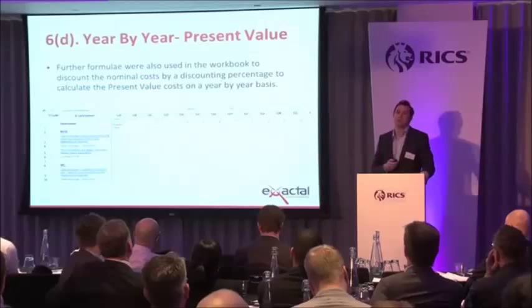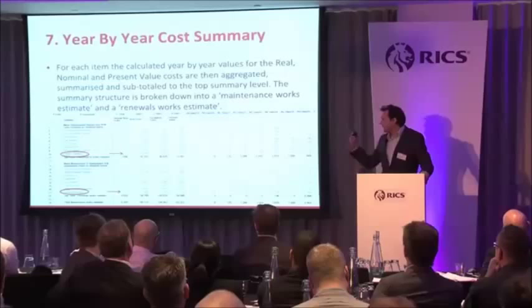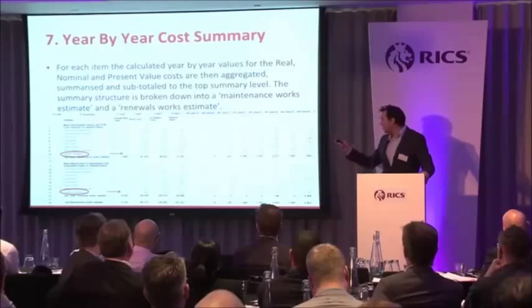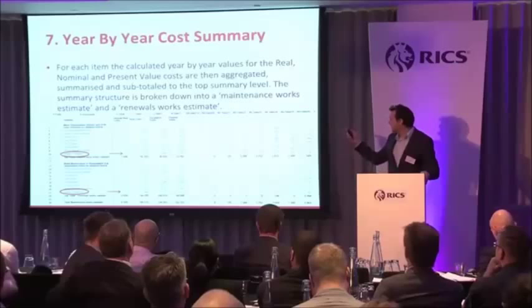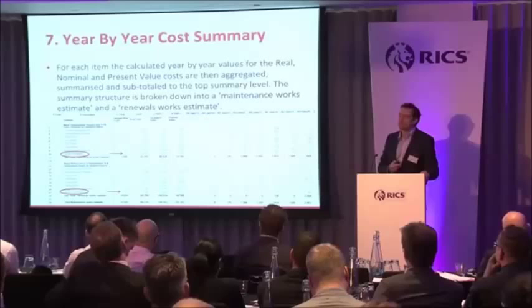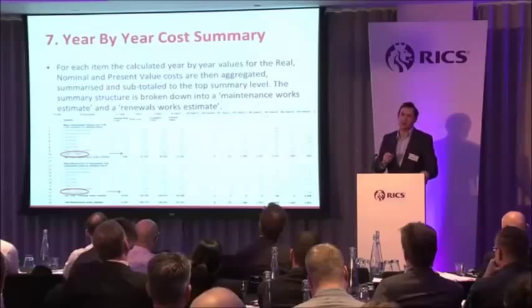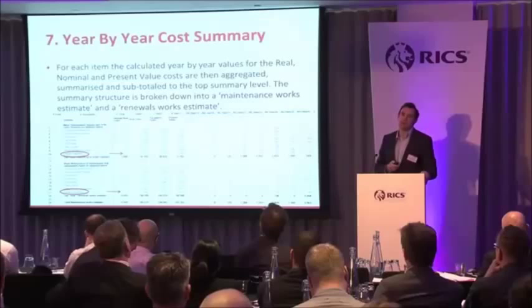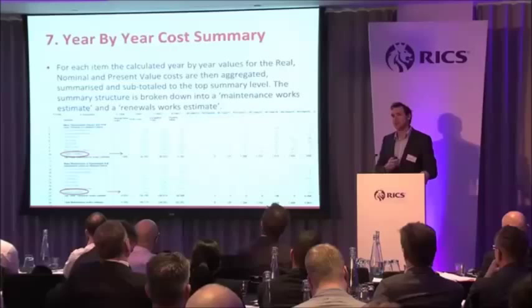This is the NRM3 summary page. What you see there is the actual elemental structure, the annual real costs, the escalated cost, the present value, and the real cost cash flow on a year-by-year basis. We had originally put into the data requirements that we wanted to see it in real costs, and thus it defaults to a cash flow forecast in real costs. If we had put in escalated costs or present value, it would demonstrate those formats per the calculations.